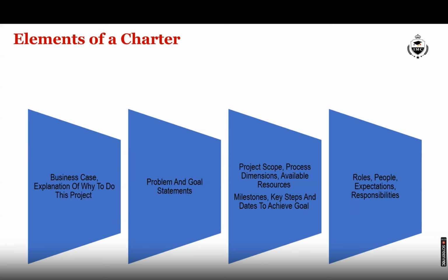I have seen some people add two more additional columns to the Excel report, actual start date and actual end date, which is a good practice, so that you can track against your planning.